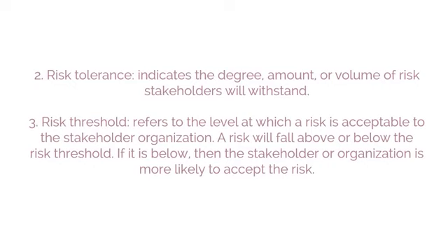Risk tolerance indicates the degree, amount, or volume of risk stakeholders will withstand. Risk threshold refers to the level at which a risk is acceptable to the stakeholder organization. A risk will fall above or below the risk threshold. If it is below, then the stakeholder or organization is more likely to accept the risk.